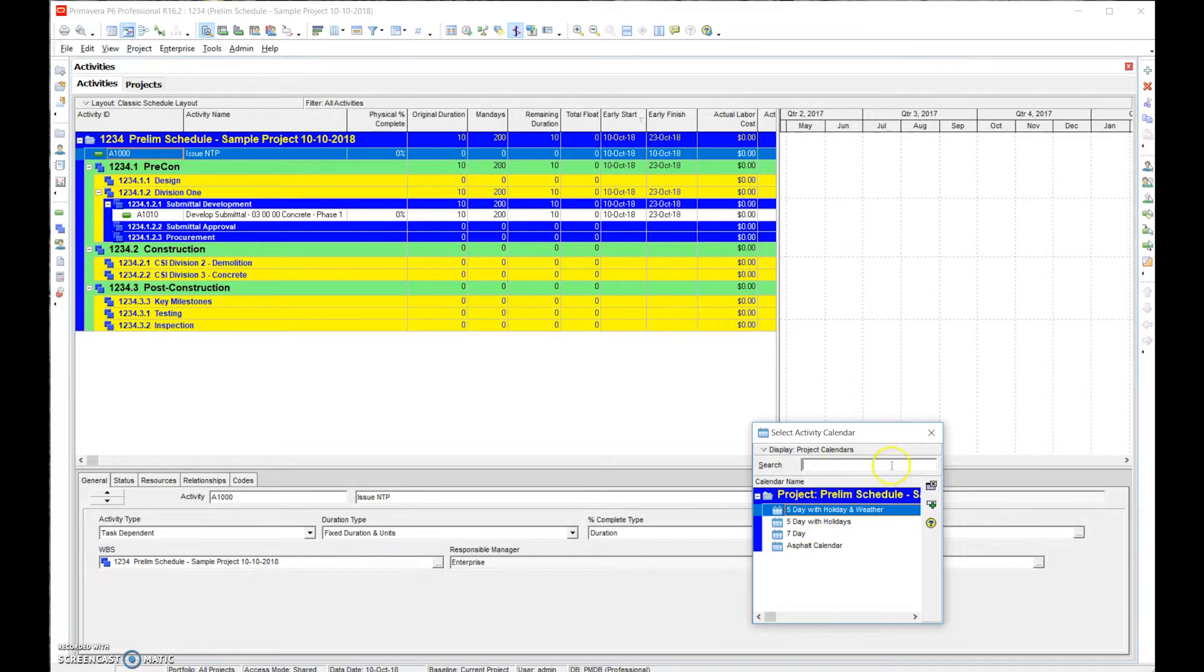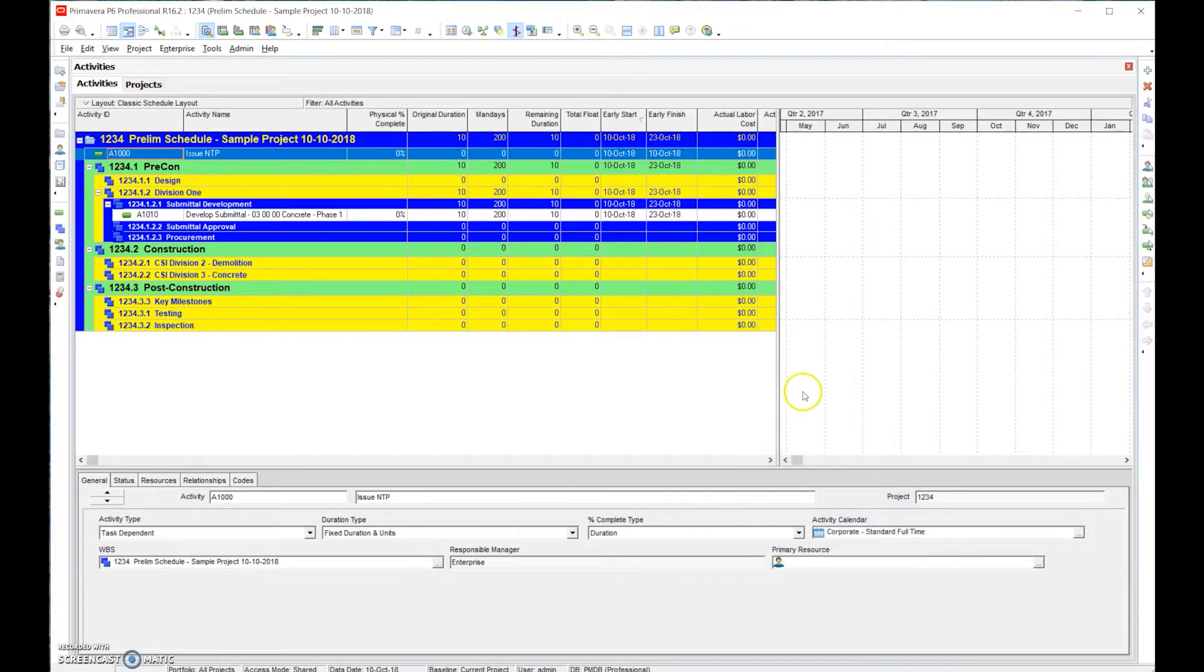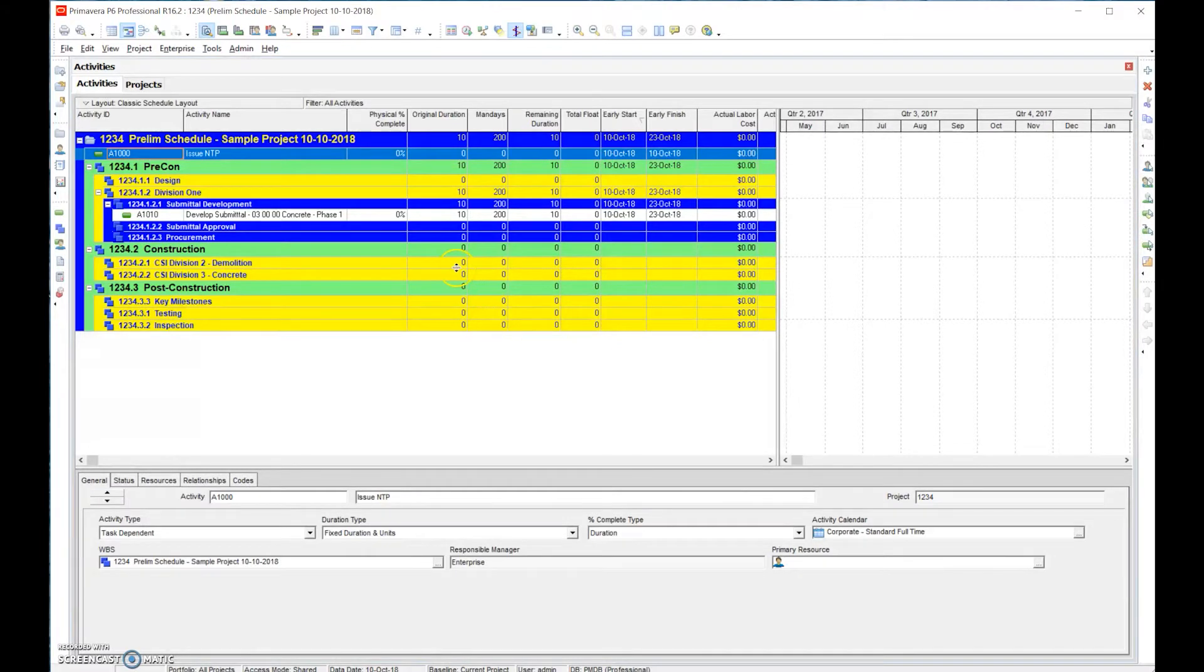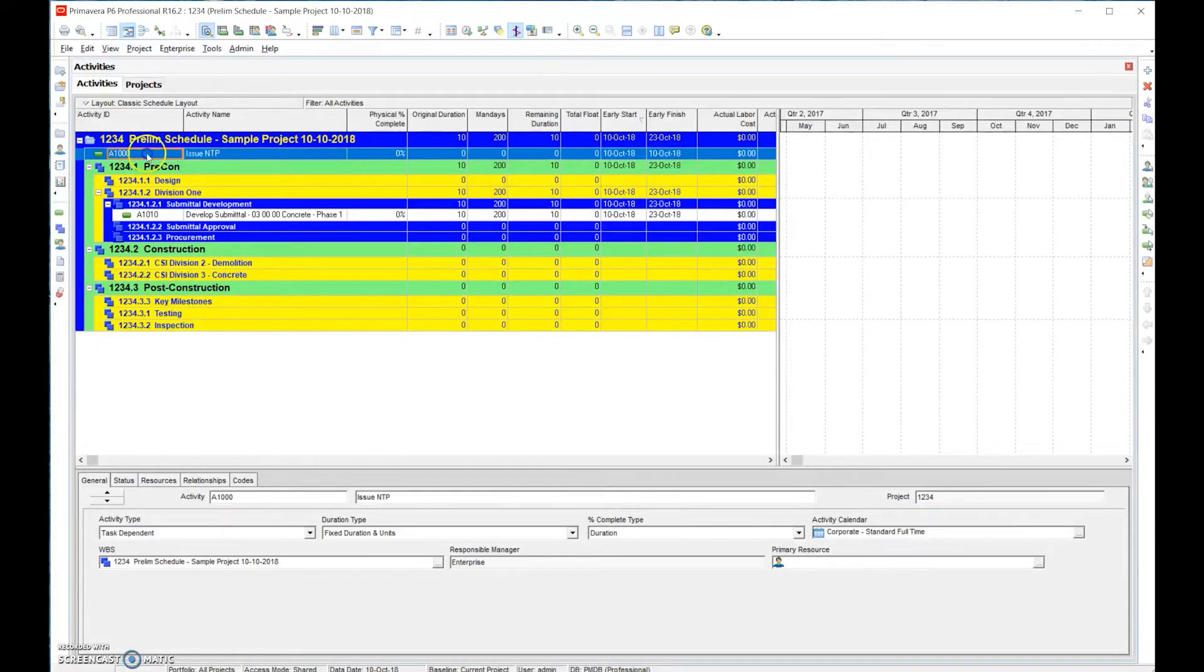If I were to go through and say okay I want to assign a calendar to each individual task. Now NTP could be any day of the week, so we'd probably assign that a seven day calendar.